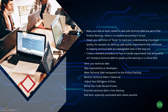You can even have a definition of done for your debt, and you can also use technical debt as part of the definition of done. For example, in your definition of done, you can say that as long as user story XYZ is satisfied plus a small part of the technical debt is paid off, the user story is complete. You can also refine your code review process, prioritize debt in your backlog, and add tests — especially automated tests wherever possible.